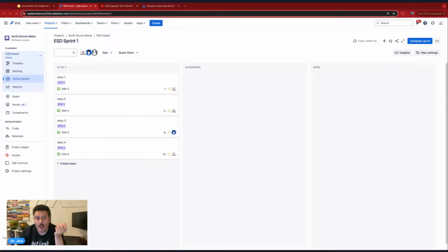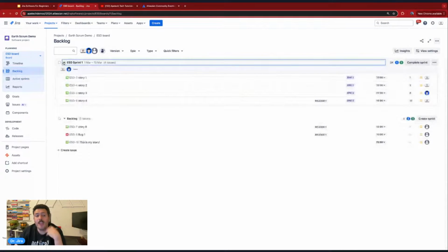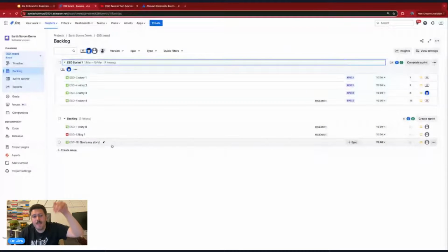Your backlog, though, doesn't have those blinders. So this story that I just created is just at the bottom of the backlog. Whenever you create anything in Jira, specifically a story, task, or bug, it's automatically going to go to the bottom of your backlog.